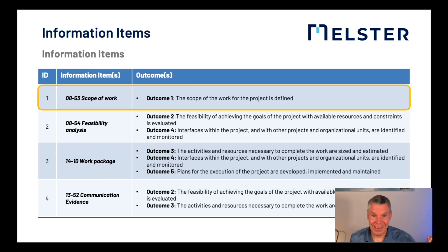As I mentioned before, this is the most crucial piece of information in the whole ASPICE universe, as it has an impact on each part of the project. Not only the planning might be incomplete if the scope is defined in the wrong way, but also the engineering or technical activities will take wrong decisions if the scope is defined either too narrow or too wide. The scope of work not only describes what the result of the project will be, but it also defines the start and end date of the development project.